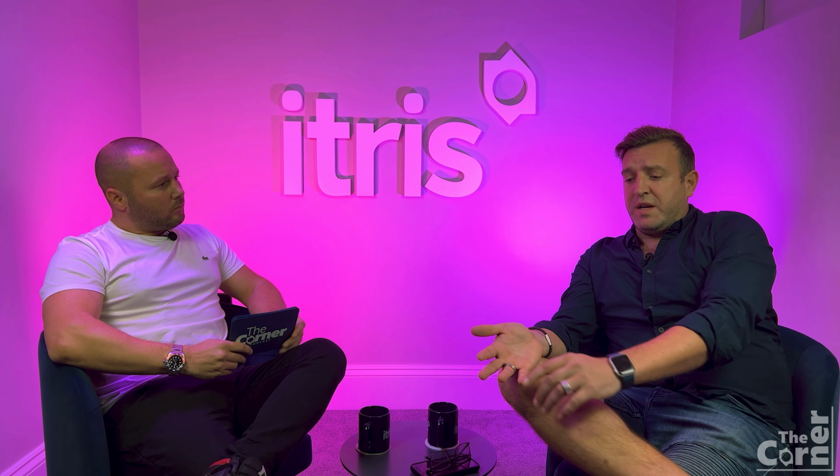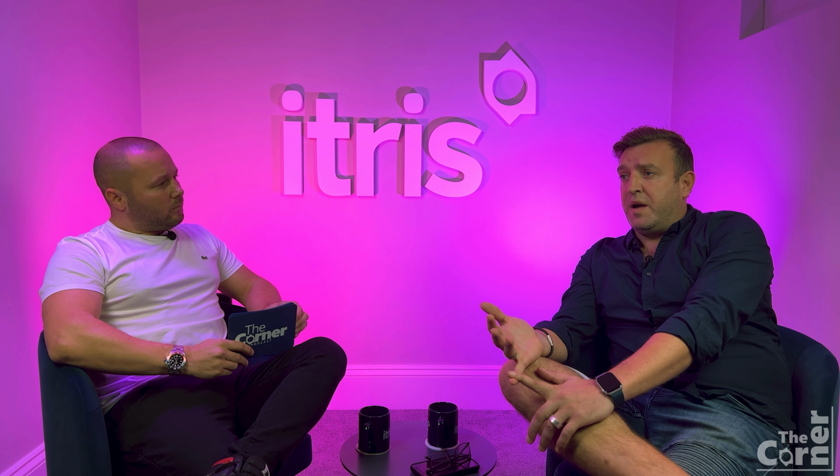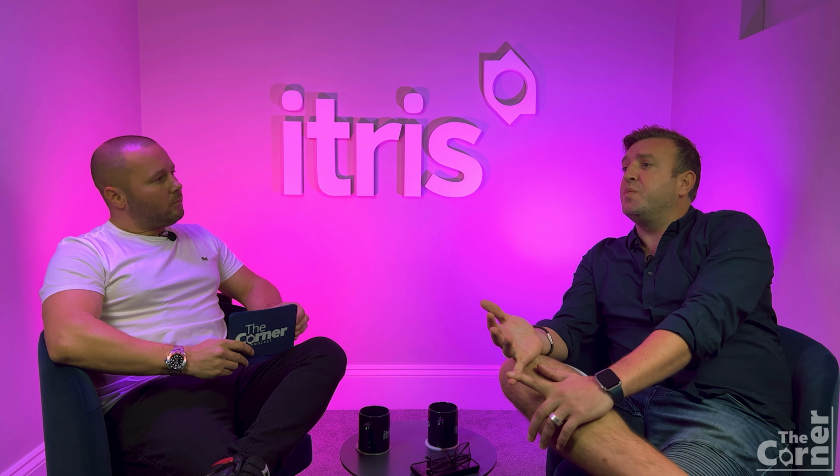And also, when it comes to IT people, I generally will have a conversation with them about everything that we offer. I go through the business critical functionality with the project liaison at the start and ask them to supply me absolutely everything that they do now, everything that they want to have in the future. With it being business critical, I will know what they need to go live with, and then I can build that into the project plan. That generally will include things such as job posting, which may have been overlooked, which leads us into that conversation with their IT team or their web team, and at that point you can start bringing other people into that project team as well.